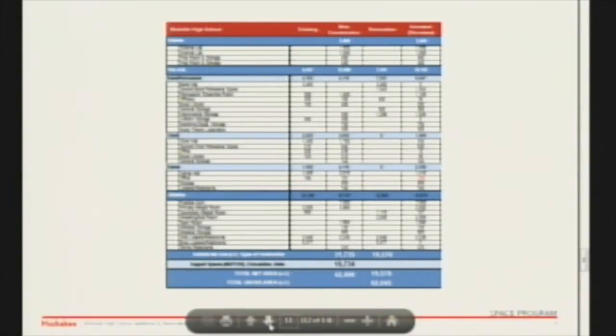Excuse me, but when you say you're on budget, what numbers are you using, per square foot or something? My question is, are you using some base square footage to say we're within budget? And where are you getting that number? The dollars per square foot is just based on our past experience with similar projects. From the last year, last 2 years? We keep running data in-house for all the work that we do. As we bid a job, and we bid 3 or 4 in the last month, that just continues to add to our database, and we just pull from that. Okay, good. Based on similar style, type of materials, type of construction.